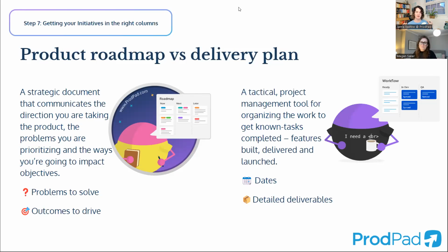And what's really happening there is that you might have 10% of your backlog filled with bugs and 10% filled with maintenance stuff and DevOps tasks. And then the other 80% is new build. Or it might be that you're closer to a 50-50 where product only takes up 50% of dev's time because dev has so much stuff, so many bugs and so much maintenance to do. The clearer picture of everything that's going out in dev is going to be your dev backlog, because that's where all these different sources come together and filter together into one backlog. But product is only responsible for that one piece of it. Generally, it's a large sliver of the work, but it's not the full sliver, if that makes sense.